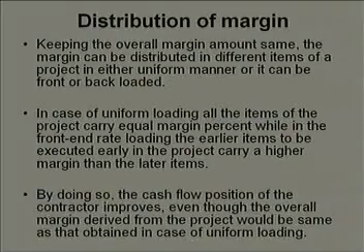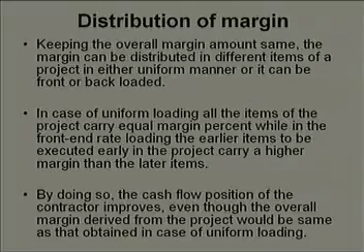So we discussed uniform loading, we discussed front loading, then there is also a concept of back loading, back end loading. The first one is front end loading, right. Some people call this back end loading also. What you will find in back end loading is that contractors will try to identify those items which are supposed to be taken up at the later stages of the project, when the project is nearing its completion. Those activities contractors would try to quote at a very high margin.